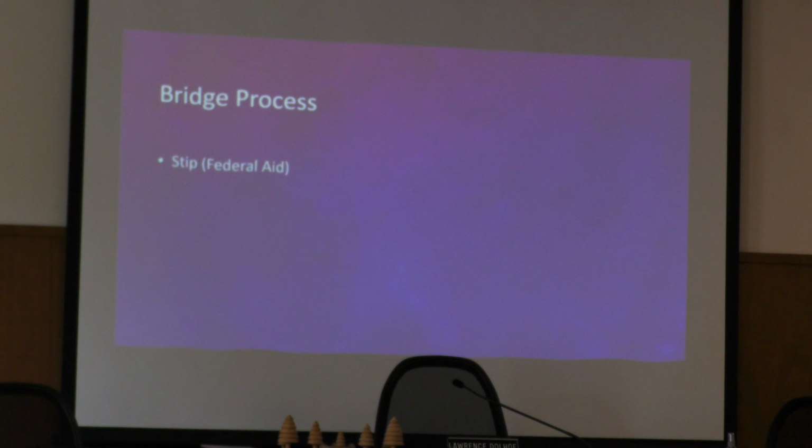The bridge process of how we fund them and how we get them replaced is through the STIP, or the State Transportation Improvement Fund, which is a federal aid process. It's a very complicated process, and it's very difficult for most towns to go through and get money to replace their bridges. There's also the Bridge New York program that came out about 5 years ago. It was supposed to be easier. It is not. It is actually just federal money coming through New York State. It was a shell game. Ask Jo, and she looks at all the contracts. They're no different than the STIP process, but that's what they did.